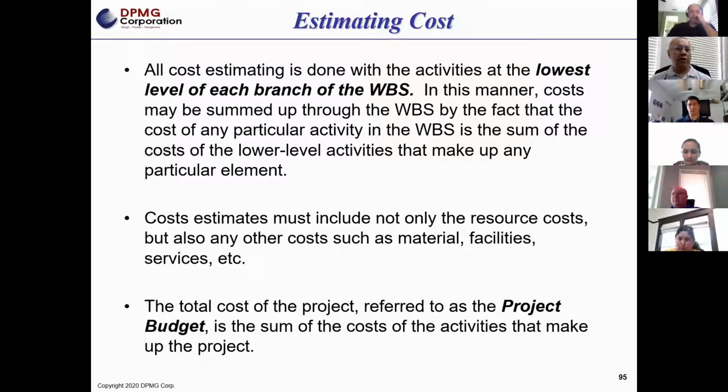You may have to break those activities down one level so you can estimate the duration of that work, because it becomes very difficult at a very high level. You can throw a bucket and say, I have a bucket, but what's in the bucket? So we may have to break that down further so you get some level of estimated hours.